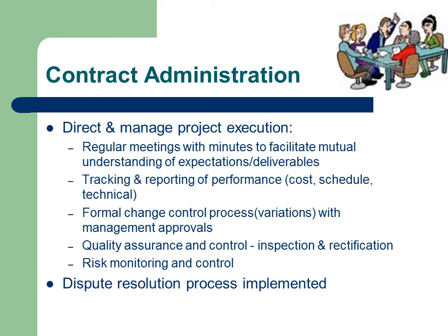Once the contract is signed, the project coordinator is often the person who is responsible for administering it. Contract administration involves holding regular meetings with the vendors to discuss progress and to ensure that the contract conditions are being adhered to. These meetings must always be formally minuted.